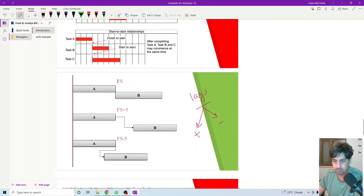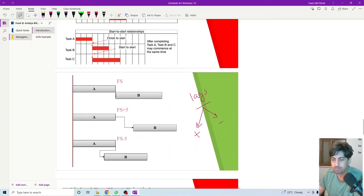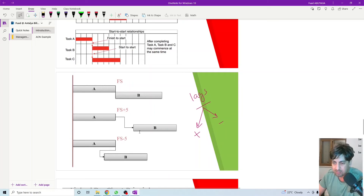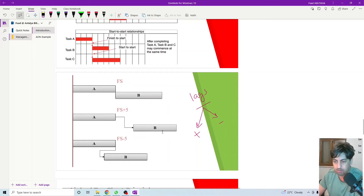So we have finish-to-start with zero lag, meaning as soon as activity A finishes, activity B can start. Or we might have a positive lag — we need to wait a number of days, such as plus two, plus five, or plus ten days before starting activity B. Activity A finishes, we wait the specified number of days, then activity B starts. This is a positive lag.